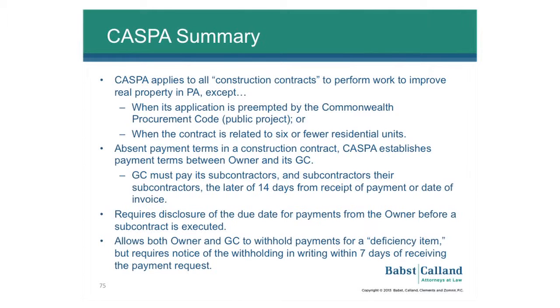The reason for that is, if you fail to comply with this provision, most of the subcontracts that are used by the general contractors in this room undoubtedly have pay if paid provisions, which, as you know, says, even if the work is acceptable and compliant, if I don't get paid from the owner, I don't have to pay you, subcontractor. That's a relatively standard provision these days, and they are enforceable in Pennsylvania.